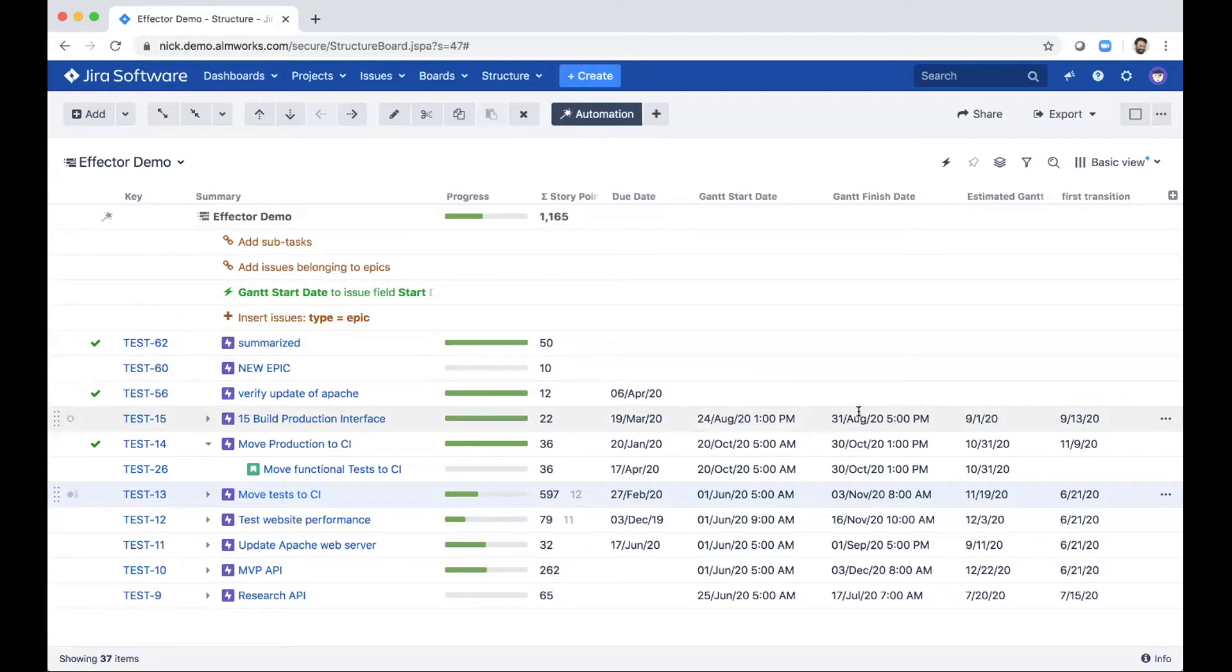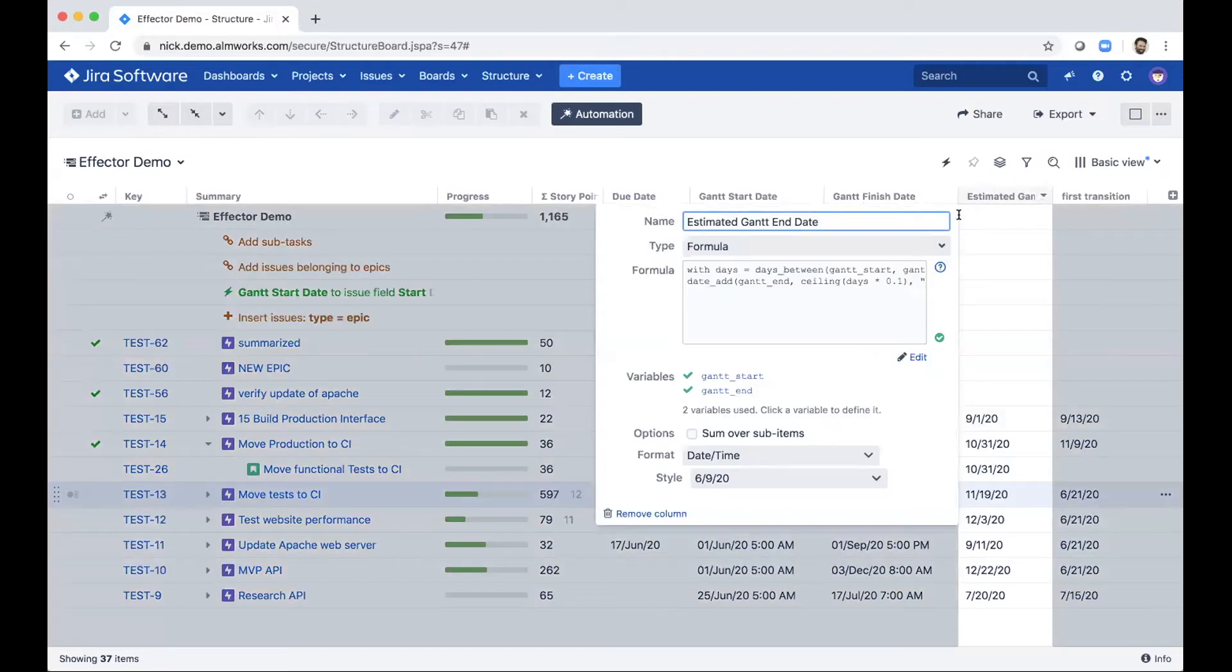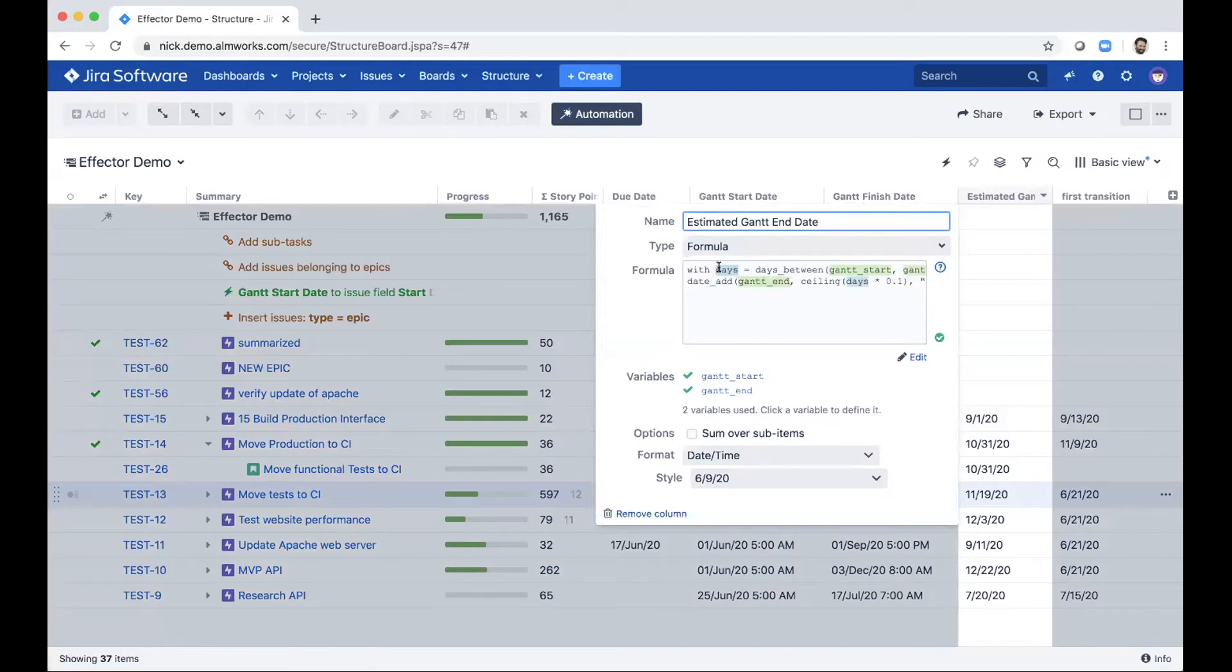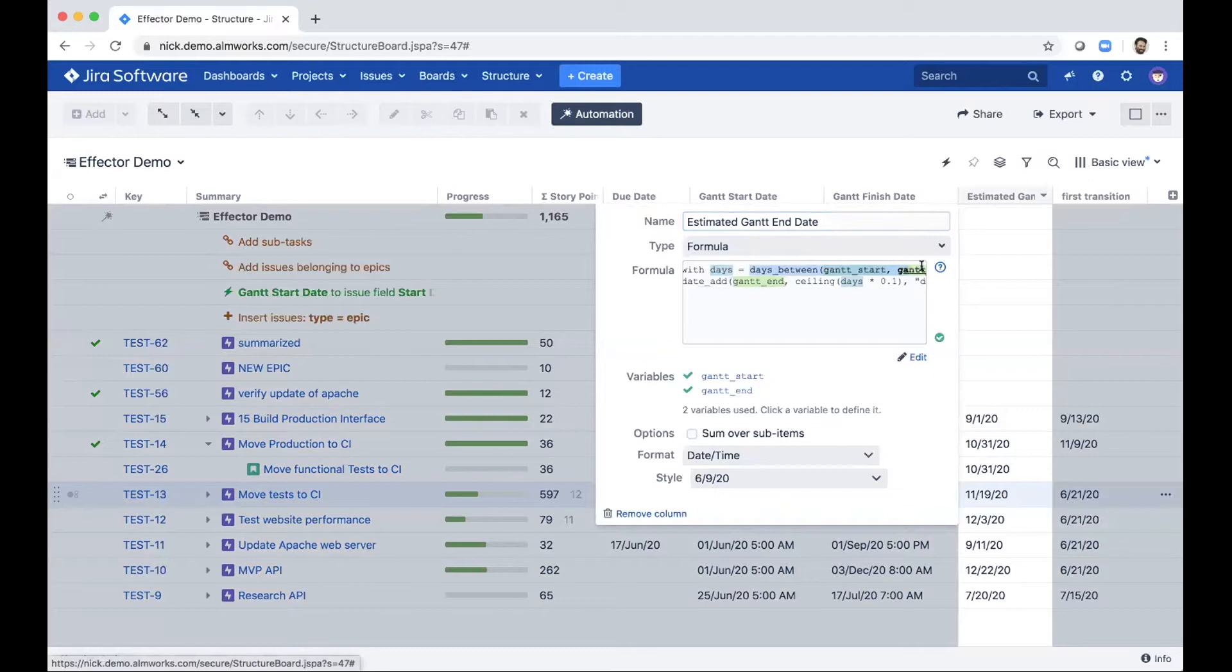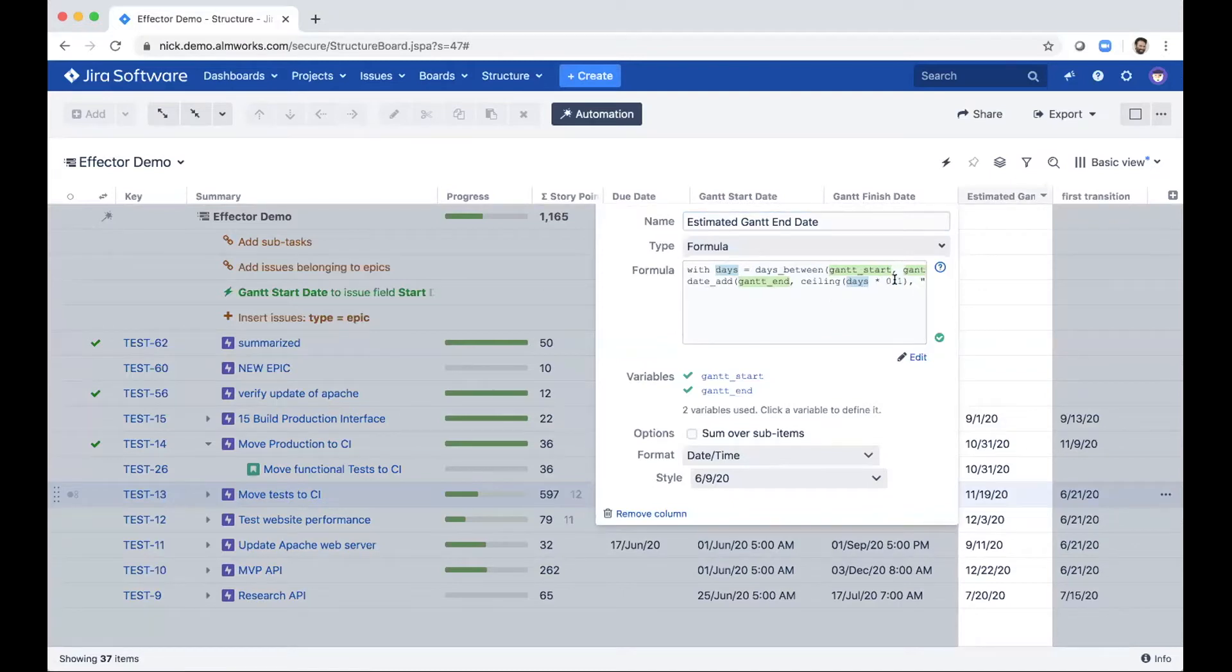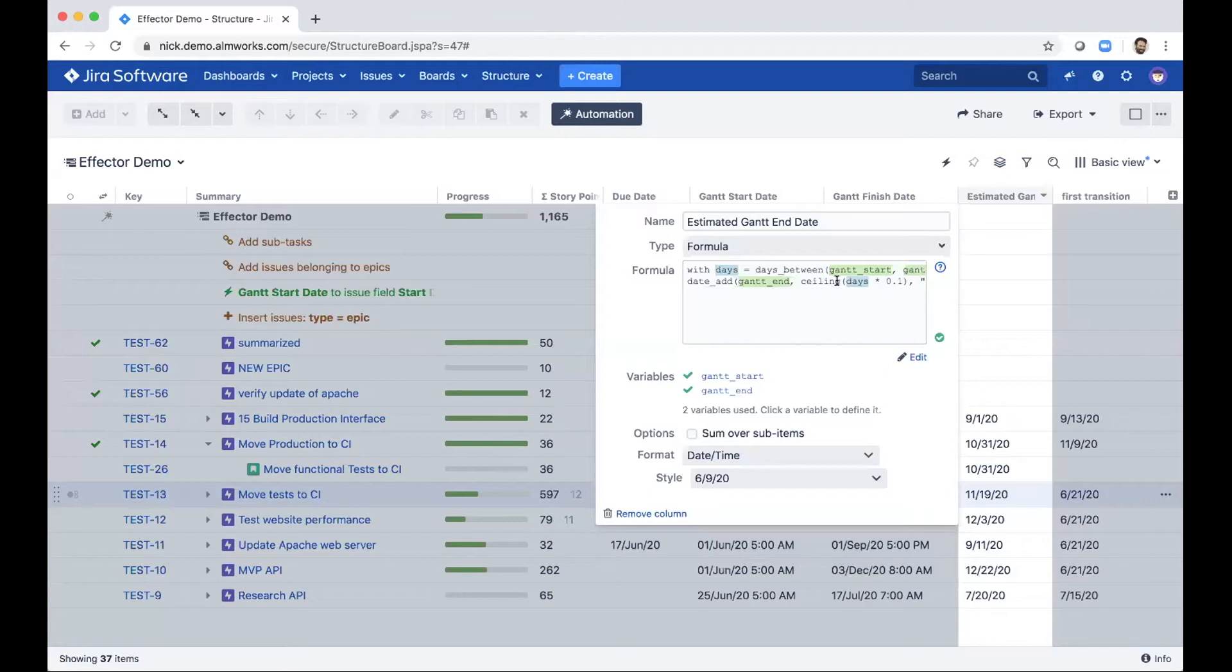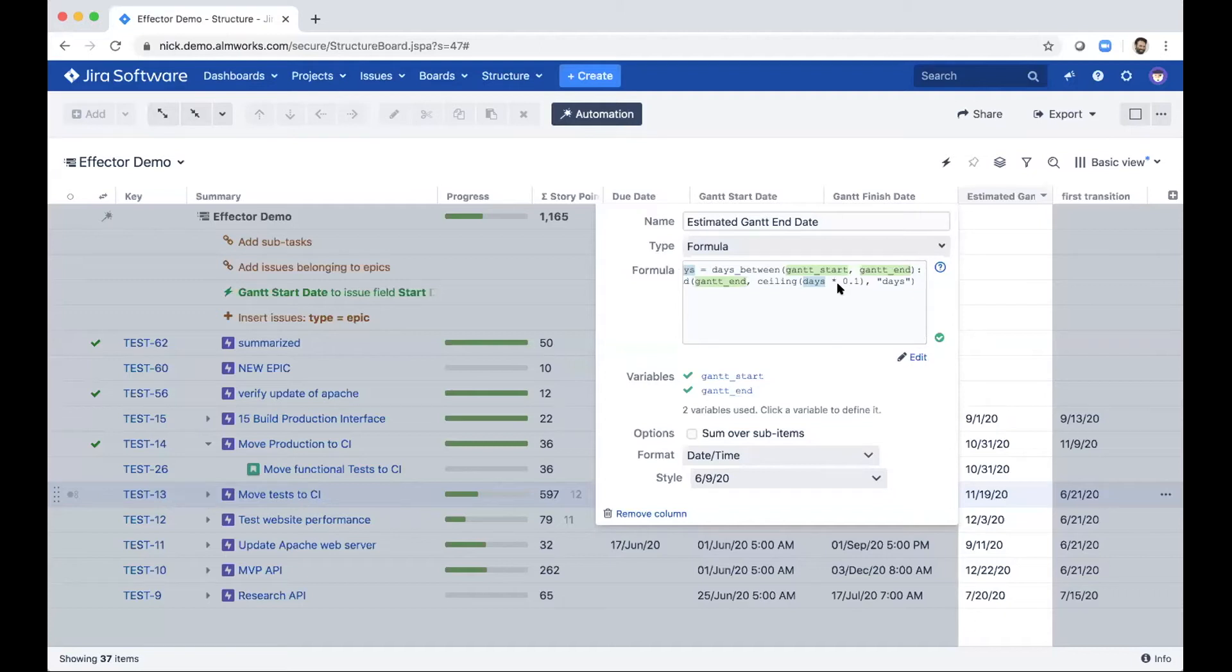So what we'll do on the other end of it is instead of just copying this Gantt finish date over directly, we can do some transformation on that using some other information that we have. So I've got this estimated Gantt finish date column. And what I'm doing is I'm basically saying how long are we taking to finish this? So how long from start to finish? And then depending on how long that is, I'm going to add an additional 10% at the end. So for every 10 days that we expect this project to go on, I'm going to add an extra day just to have a little bit of flexibility. And there's a lot that we can do with these formula columns, but just wanted to use a simple example here. So it's not quite the Gantt finish date, it's just plus an additional 10%.